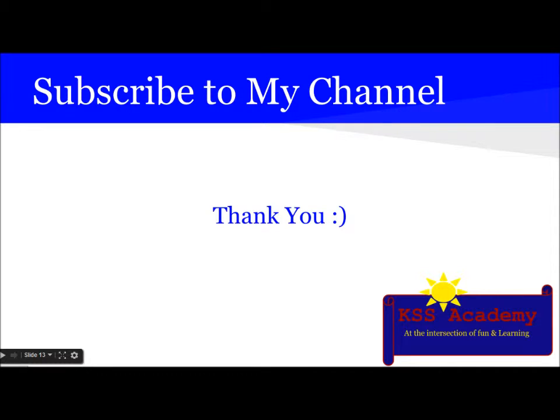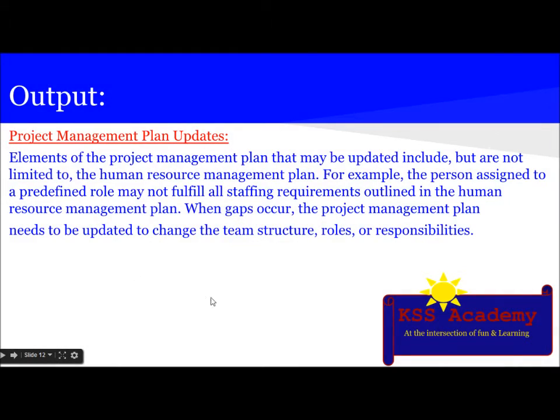The tools and techniques involved are pre-assignment, negotiation, virtual teams, acquisition or subcontractors, multi-criteria decision analysis. And the output is project staff assignment and resource calendars. And one more output is there, project management plan updates.